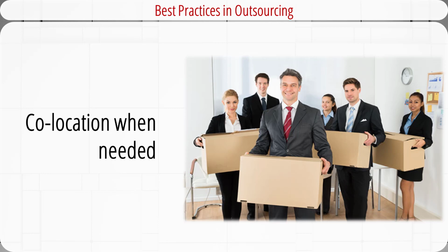This is especially relevant for complex projects in which close collaboration from different parties is required to be successful. When co-location is not practically possible, the travel budget for the project should contain ample funds to support timely travel to different organizations. Co-location is less relevant for independent work that does not require ongoing coordination between professionals from different organizations.